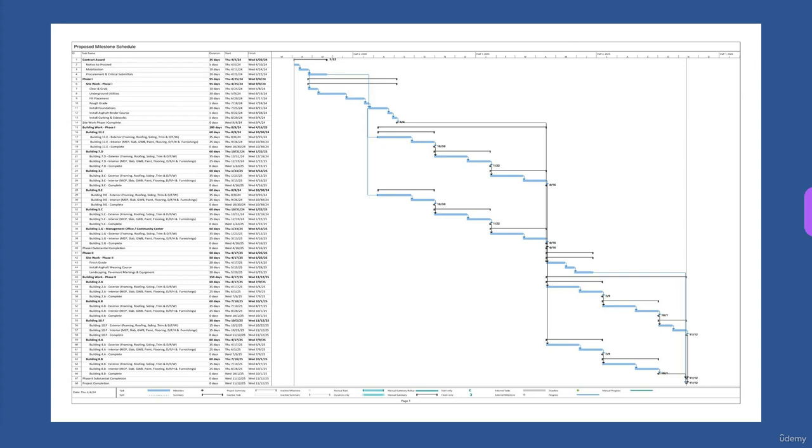The first part you have site work, and it gets into underground utilities until you get to a point where you're at a foundation, and then you do building one, and you do the exterior where you're doing the foundations and the framing, the roofing, the windows, and the trim, and then it goes into the interior where you start doing all your MEP trades and your painting and your finishing and your furnishing and all that kind of stuff, and then complete. So it kind of gives you a quick view: what am I doing on the outside, what am I doing inside? It shows two buildings being done at the same time.